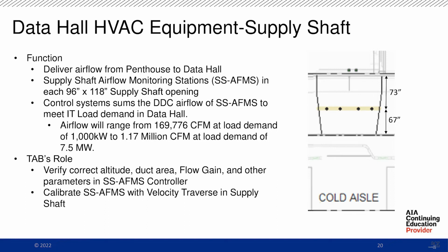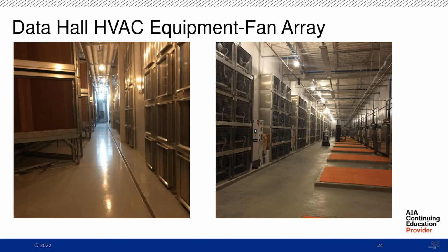Relief fans, again, their function is pressurization. They're maintained at 0.05 in the space. We'll record static pressures and test at full capacity with the bell grid, and ensure all the dampers operate correctly.